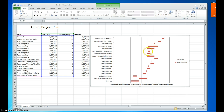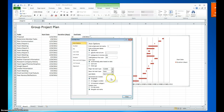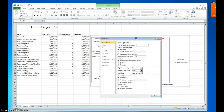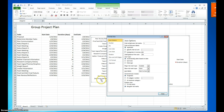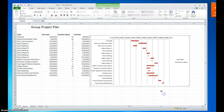Now if I click off, you can see all of the tasks. I'm also going to format the x-axis and reverse the order, because we have the last task appearing at the top. I'll go into the Format Axis dialog box and check Reverse Order. Now we have what appears to be the beginning of a nice-looking Gantt chart. We don't need a legend, so I'm going to delete it.